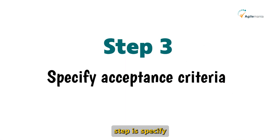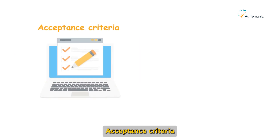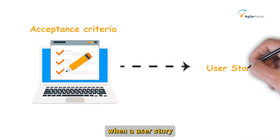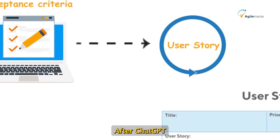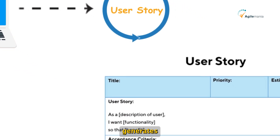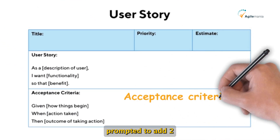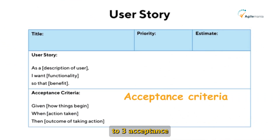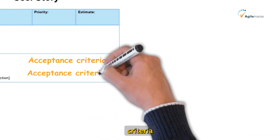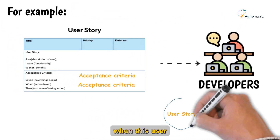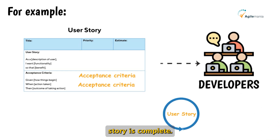The next step is to specify acceptance criteria. Acceptance criteria are essential for defining when a user story is complete. After ChatGPT generates the initial user story, prompt it to add 2-3 acceptance criteria. For example: 'Add 2-3 acceptance criteria that would help the dev team understand when this user story is complete.'